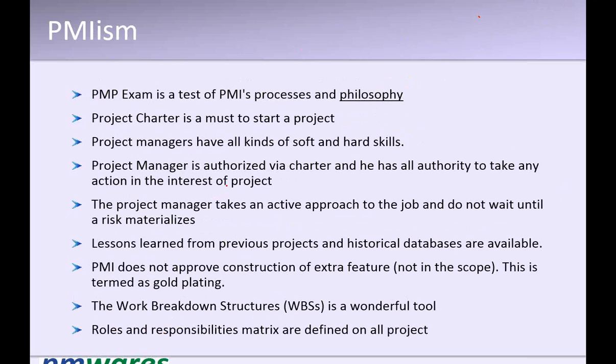No extra features. That means a feature that is not included in the scope is not supposed to be provided. If you provide such a feature which is not in the scope, it is called gold plating. PMI expects that, to make the customer happy, you should not provide anything extra except what is there in the scope. This is true in practice also. We should never provide anything extra which is not in the scope. If you think something is really value added, you propose it to the customer, get his approval, include it in the scope, and then do it. Not without including it in the scope.